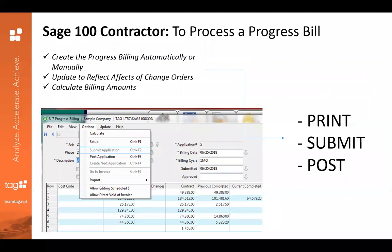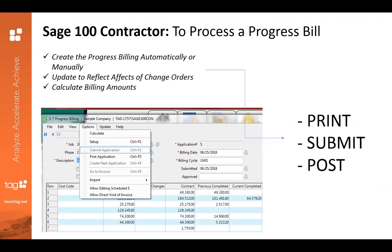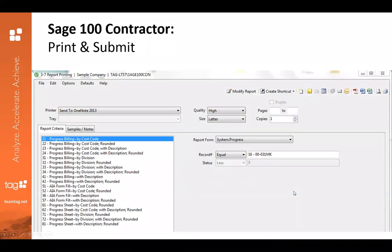Now that you have created the progress billing — automatically or manually — once you've updated to reflect all of the change order costs and calculated the billing amounts, for every additional application it will bring in all of the information for you automatically. Customers have really liked that it does that for you and you don't have to go back to your last application. It's very simple and easy — then you go ahead and submit and print.